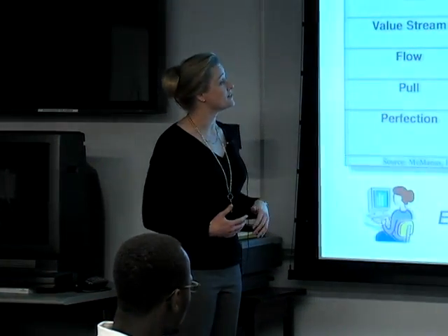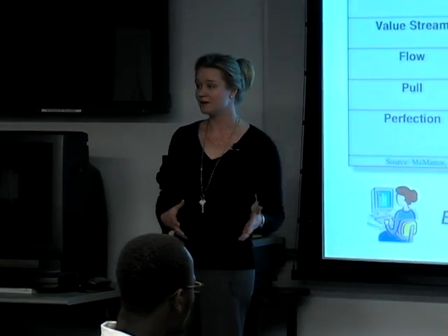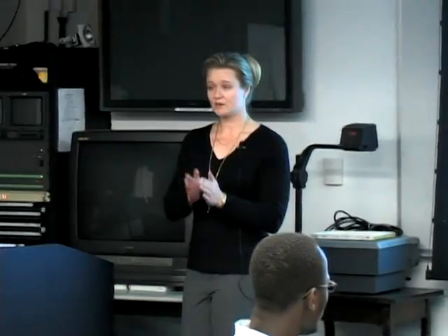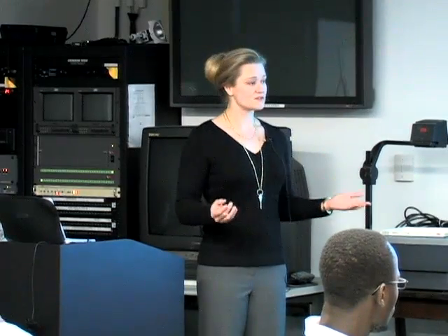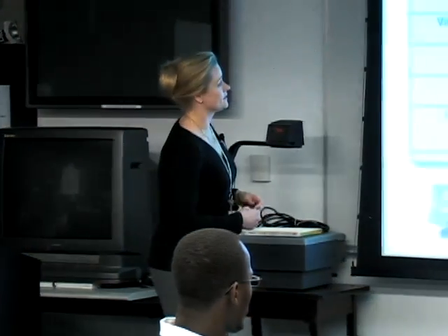The second contrast is that in manufacturing, your goal is very defined. When you start manufacturing, you have a very specific set of specs and drawings, and at the end, you expect to come out with exactly the product that you wanted when you started the manufacturing process. Now, this is different than engineering because in engineering, our goal is emergent. We have some sense that there are requirements, and we have maybe some notion of how we might meet those, but the whole process of engineering and design is to look at different alternatives and to then come up with a set of specifications for a product that you can build. So your goal is really emergent in that sense.